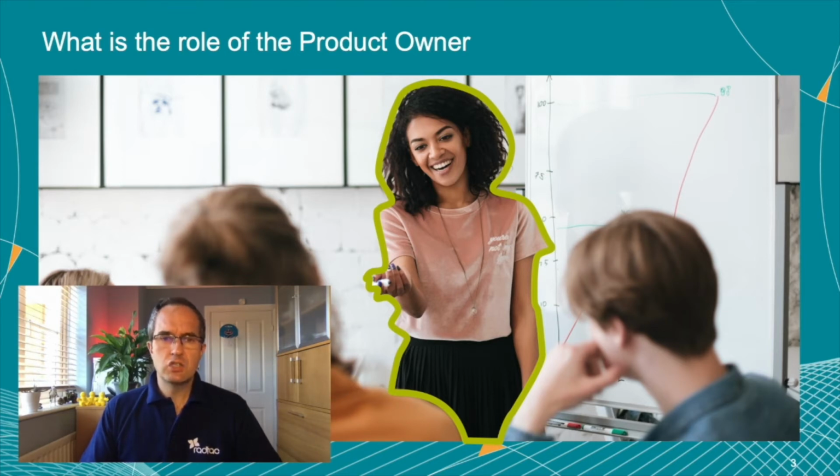This collaboration is key during the lead up to PI planning meeting to understand the demands of the system team and the upcoming PI. During the event itself, they help to sequence the work to maximise value delivery, and with the Scrum Master, manage the risks and dependencies across the teams.